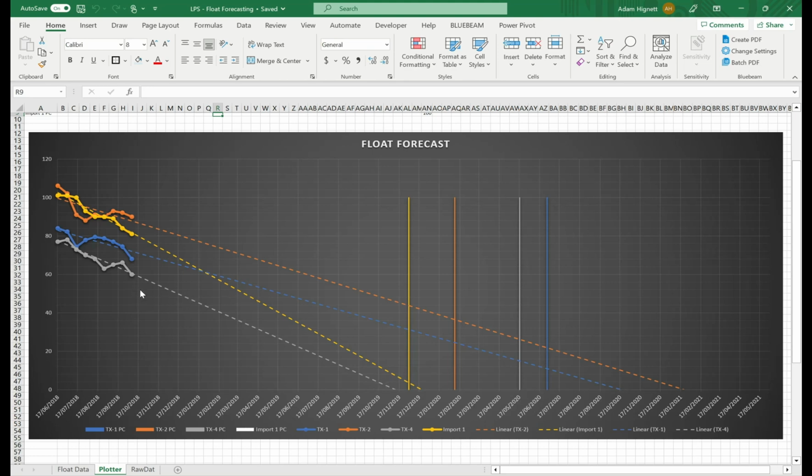Now obviously what sits behind this are the reasons why there's been float burn, why is productivity down, why are things inefficient, and that's a subject for another video. But this is just a nice easy tool that you can use even if you just have one area, one completion date. You can see how much total float's being burnt through each update and investigate those reasons why.